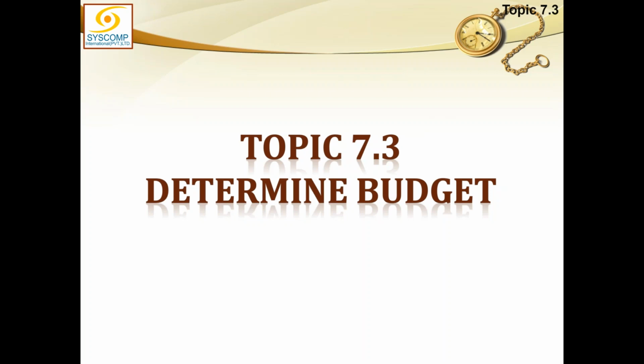So therefore, this estimate is this much. If you want, we can separate this estimate from the office building side, and then the office building will cost the same. But the remaining estimate is for the cables, and that you can estimate yourself. Once we gave this argument, they agreed, and ultimately they allocated that budget to us. So this was just one example.